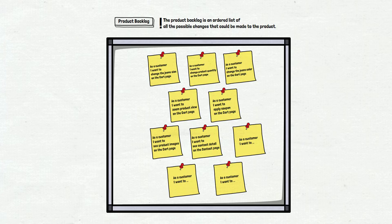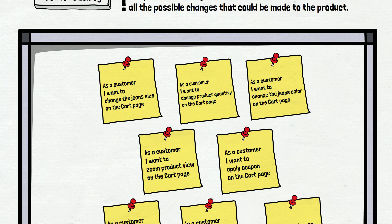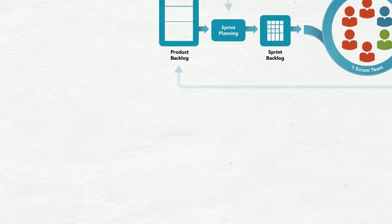Cards describe the requirements from the user's perspective. For example: 'As a customer, I want to change the size of the jeans on the cart page.' Or: 'As a customer, I want to change the product quantity on the cart page.' And a lot more cards like this. Basically, these are all functionalities, improvements, and bugs planned to be developed and delivered. It should be prioritized, so the most important stories are on the top. That's enough about the product backlog.